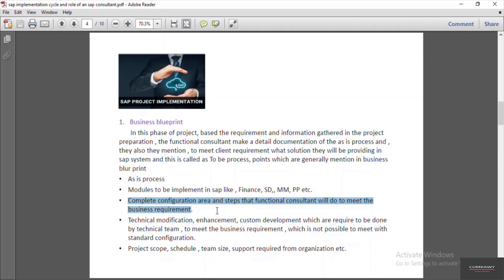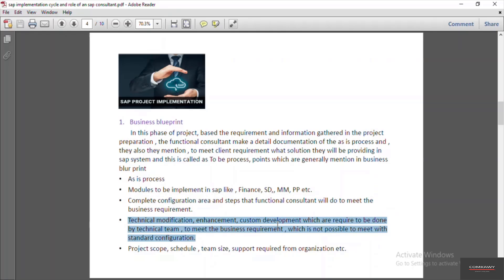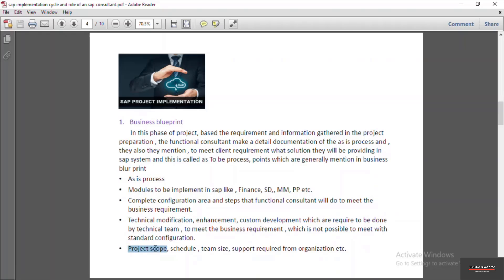The functional consultant also mentions what technical modifications, enhancements, and custom development are required by the technical team to meet the business requirements. Since SAP comes with predefined best practices, every organization requires around 20 to 30% customization done by the technical team. This is also mentioned by the functional consultant in the business blueprint document. They also decide the project scope, schedule, team size, and the support required from the organization.